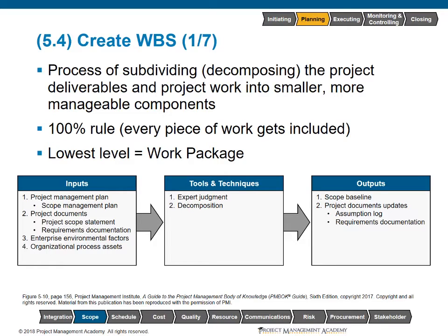It's very important that we do capture everything within the WBS because this is going to be our starting point as we'll do further decomposition in subsequent planning processes to come up with our estimates for what type of resources and how much money we're going to need to complete the work.